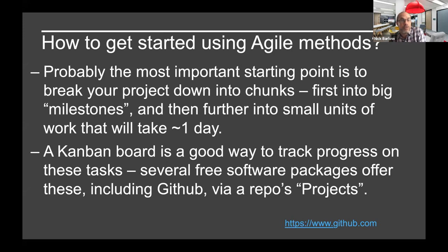And I think the most important one, sometimes the most difficult skill, sometimes it's easy, sometimes it's very hard, is to break your project down into chunks. So you'll have a whole big project, then within this there'll be several milestones, which are fairly major pieces of work. Then you break those down further into things which you can do in anything from a few hours to a couple of days. It's a really important thinking exercise, I guess.